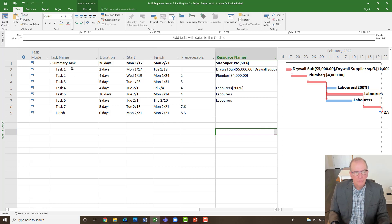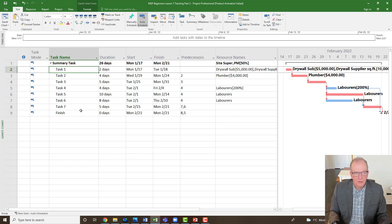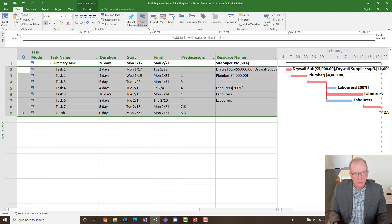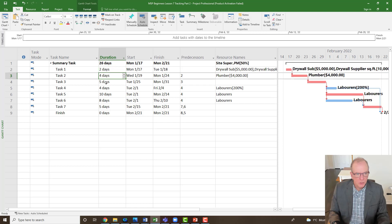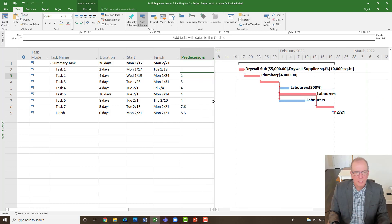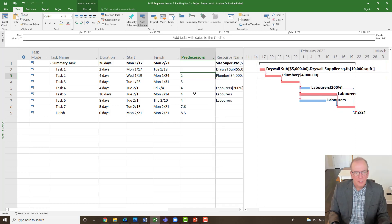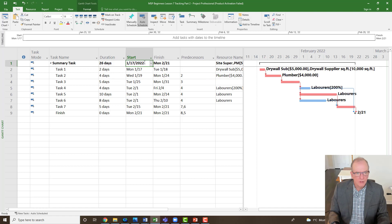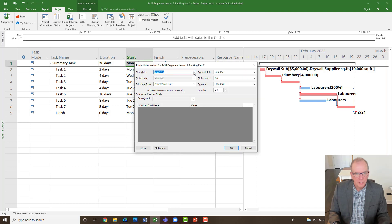In this particular video I've just set up tasks 1 to 7, called them simple names, and I have one called summary task which is just the heading. If you want to recreate that, you can type these in, indent below the summary task, and put in these durations and predecessors. You can always put in your own date — I've got February 17th, 2022 here — and if you wanted to change the date, you go to the project tab, project information, and put whatever date you want in there.